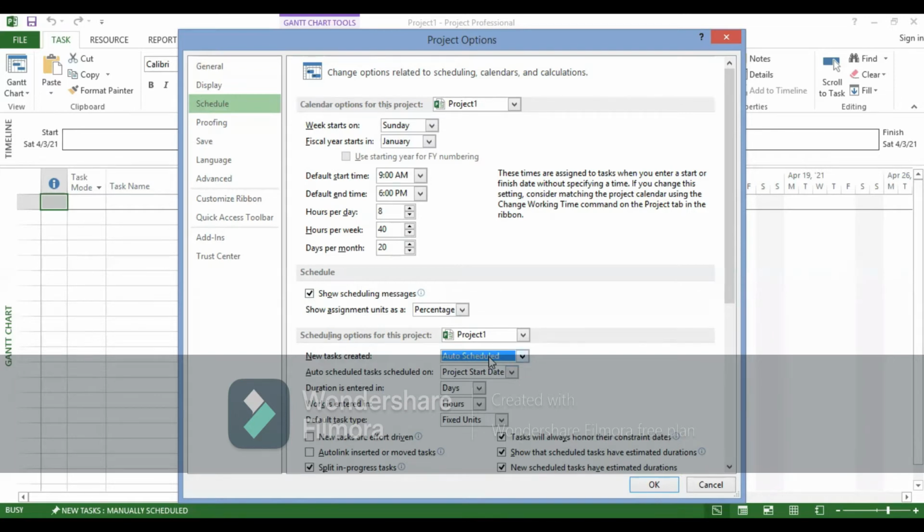If you have done an overlapping activity, or a resource assigned in two activities at the same time, the system automatically will alert you, I'll take care. That time is conflicting with that, right? So you need either to move that date or to assign another resource. That's only two actions. Or you delete that activity, which is impossible. Auto schedule tasks on.